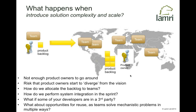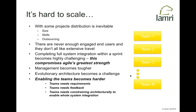Throwing in geographical distribution makes the communication challenge tougher. As we grow, distribution sometimes becomes inevitable — customers don't have enough engaged end users willing to travel and co-locate with teams all the time. Completing full systems integration in the sprint becomes difficult, and as soon as you compromise that, you've thrown out one of agile's greatest strengths.